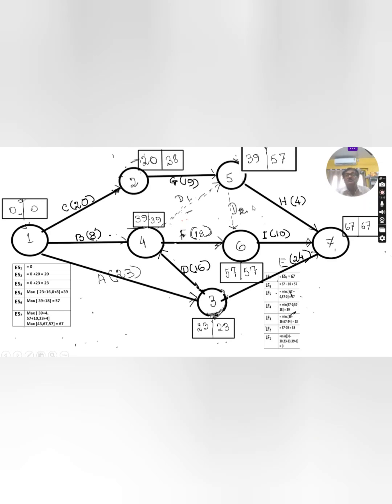And from this path, 39 plus 0, that is 39. It should be written here also, but it is not written. I am seeing a mistake. That should also be written, 39 plus 0. And what is the highest for this? You should correct it. Okay, 57. That's why the earliest start time of S6 is 57.